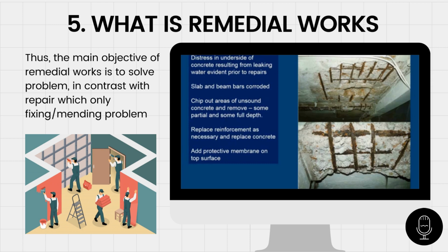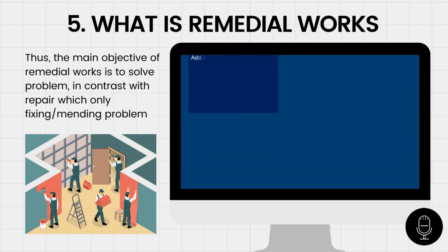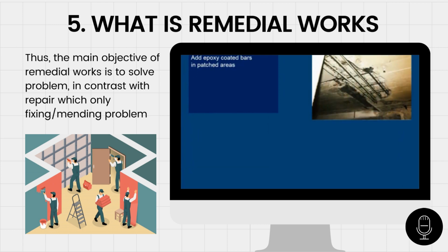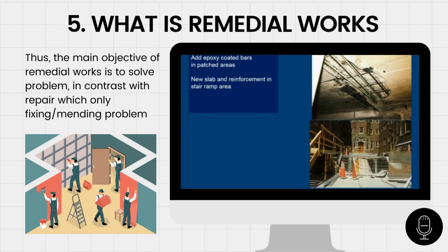Once we got done with these repairs, we of course had to add a membrane in order to protect it. We added epoxy-coated bars in the patched areas. New slab reinforcement was added.